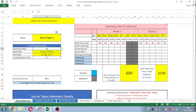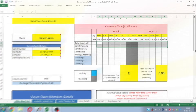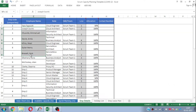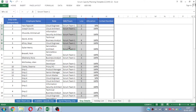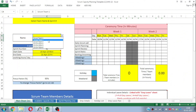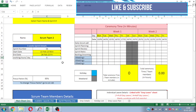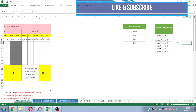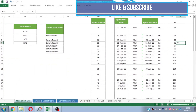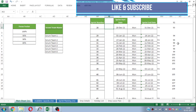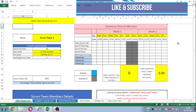This is the main sheet. Whenever you get this template, all you need to do is delete the existing editable content and enter your employee details — write their names, roles, and scrum team. You can define your own scrum teams here. Select the scrum team for which you need to do the sprint capacity planning, select the sprint number. This is a customizable sheet — if you need to change any details like sprint number or sprint dates, you can simply change them from these columns.